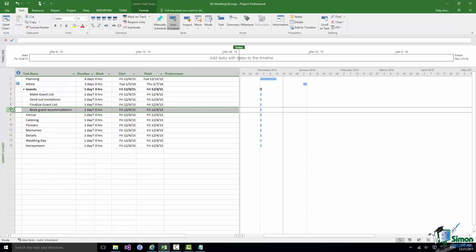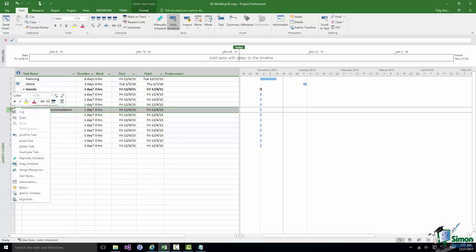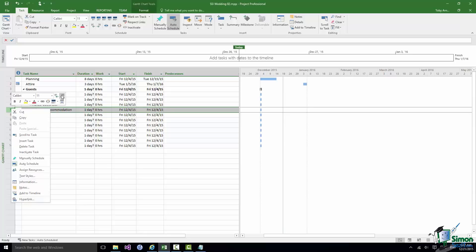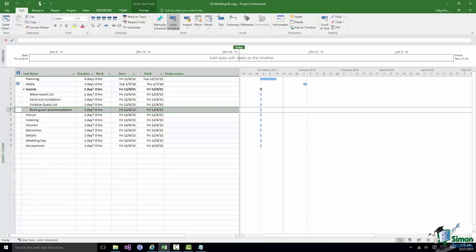Note that the Indent and Outdent buttons are also available on the Mini Toolbar when you right-click a task. Project offers the most likely commands on either the contextual menu or the Mini Toolbar, so keep an eye open for those. At this point, don't worry about how long each task will take or when it needs to happen — we'll come back to durations, timescales, and dependencies in later sections. For now, the goal is just to put in the structure of the project.